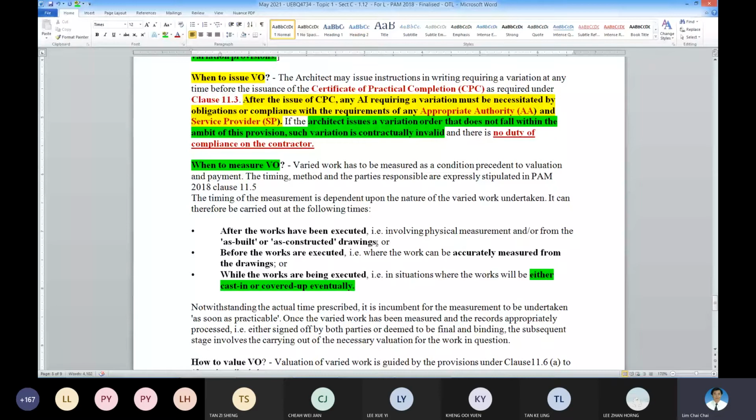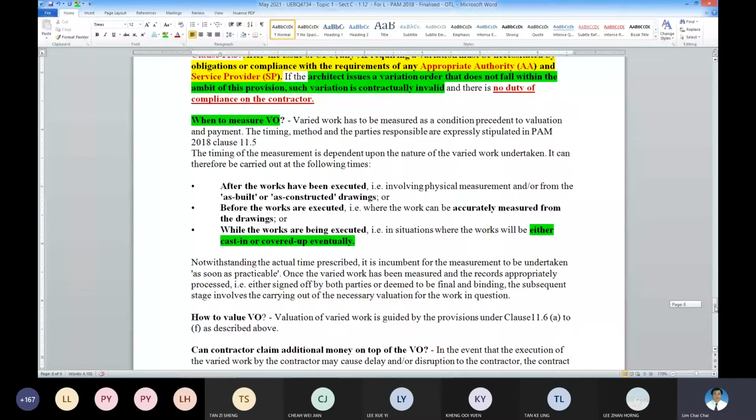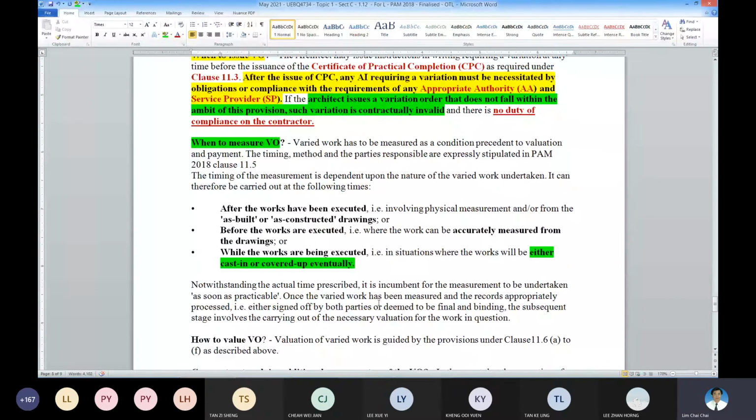More often than not, as a contractor, if it is a very major type of work that runs many months, then you take the measurement as work in progress. And for some of them, you may even know your figure if the drawings are clear. So the rule is to try to submit your claim contemporaneous with your work as soon as possible. When the works are ongoing, you submit and do your measurement. Contemporaneous will be the keyword again.